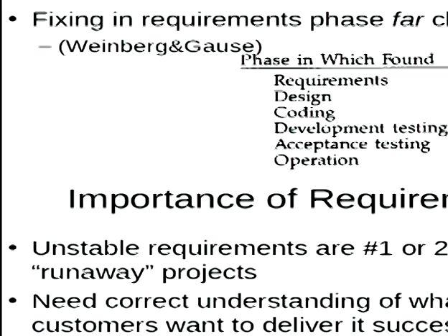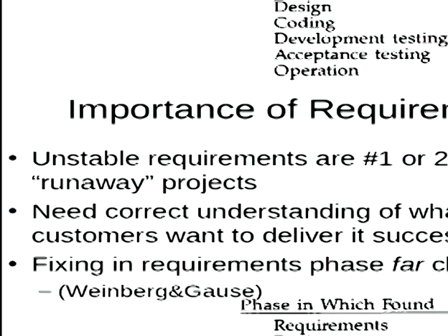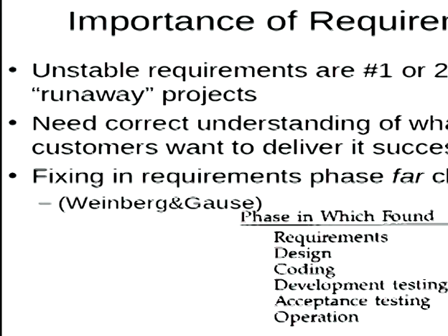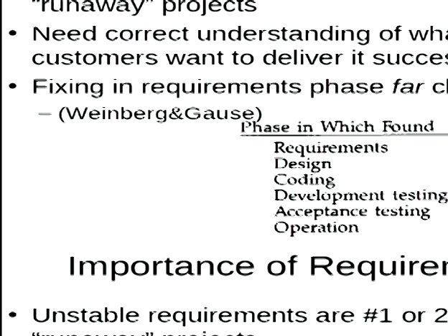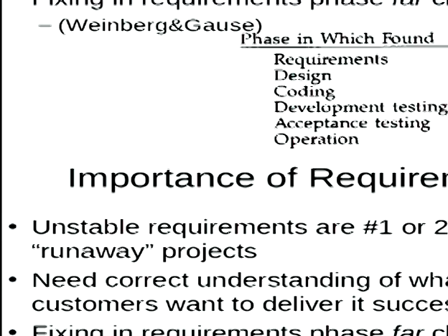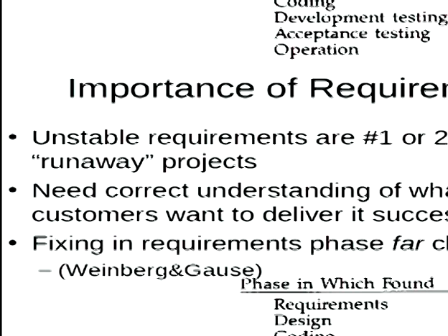If you catch it in the design phase, when you're designing the high-level data structures and how they'll work together, what classes they'll be, and how they'll depend on each other, even to the point of what calls what, you're going to have a lot less work because the code hasn't been written yet. The tests are typically not yet written, or they've just started towards some basic coding up of early tests. So the earlier you can find it, the better.